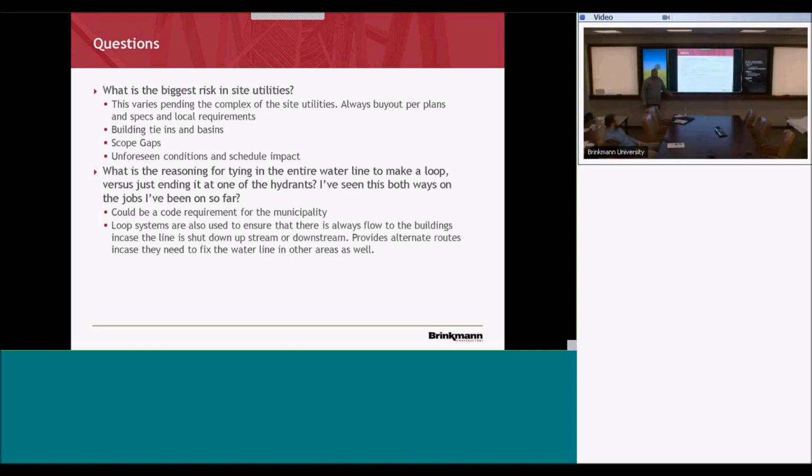I got something that I don't know if it's technically a Pfizer, but it's something we did in Wisconsin this year that the super, fortunately from the north, suggested going into winter. I think it was like $600. We punched in finger drains on all our area inlets in the parking lot, because if you set the final grade above subgrade, you're going to hold water all winter.